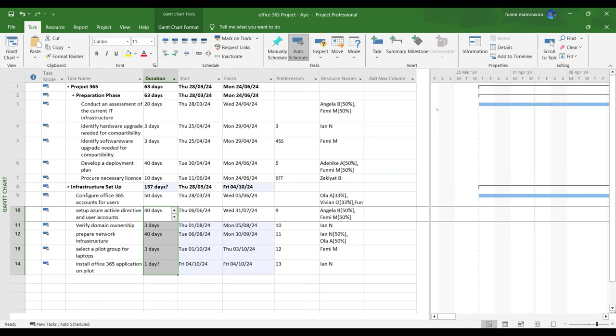Yeah, so you need to go one by one to say, based on this particular task, how much time? So don't forget the percentage is all about time. You're saying, how much time of Nike do we have on this particular task? And Nike will tell you, you know what? It's Monday. On Mondays, my day is 8 hours, but out of that 8 hours, I've got my BAU activity for 6 hours. So I can only give you 2 hours of my time on Monday. So if she can only give you 2 hours on Monday, and that task is on a Monday, you're only going to be assigning 15% or 20% on that particular task for that day, based on what you've spoken to her.